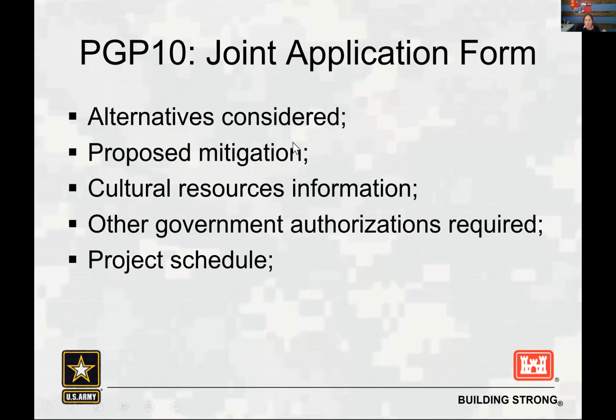Another way of mitigating impacts would be including best management practices during construction activities. That's the kind of information we need to know. Are you putting silt fences or something to prevent erosion and sedimentation during construction activities? Don't just leave it blank.